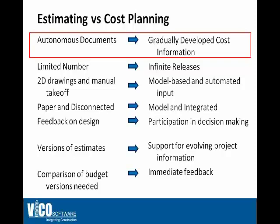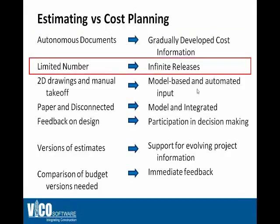We'll see that in the demonstration. Due to the amount of work involved in creating 2D estimates — especially in the construction documentation phase — the number of estimating versions that can be created is limited. There's just not enough time, and that can lead to big jumps between versions with significant cost variance. In 5D cost planning, information is replaced gradually, and the result is, at any point in time, a 100% complete cost plan, allowing you to create an infinite number of cost plan releases.